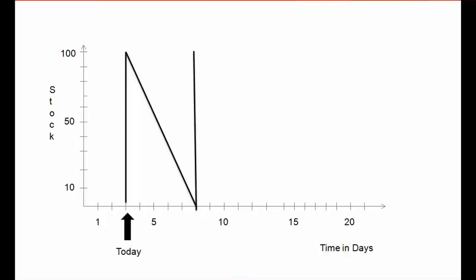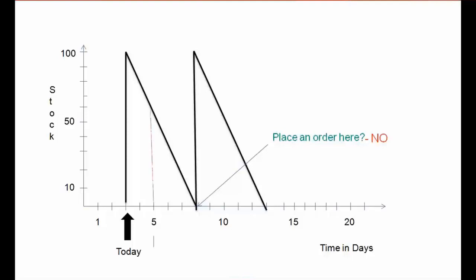Now this process will continue. But my question to you is, shall we place an order here? Should we place an order at this point? The answer will be no. Why no? Because if you place an order on the day when the stock is finishing, it might take maybe three days or four days to get the stock. So it doesn't make any sense that you will be placing an order for the stock on the day when the stock is exhausted. That means we need to place an order for the stock in advance. How many days in advance? If it takes three days for the delivery process, then we need to place an order three days before. So in that case you can see what we call RLT, Replenishment Lead Time. So we will be placing an order three days ahead. This is one thing which is known as Replenishment Lead Time.